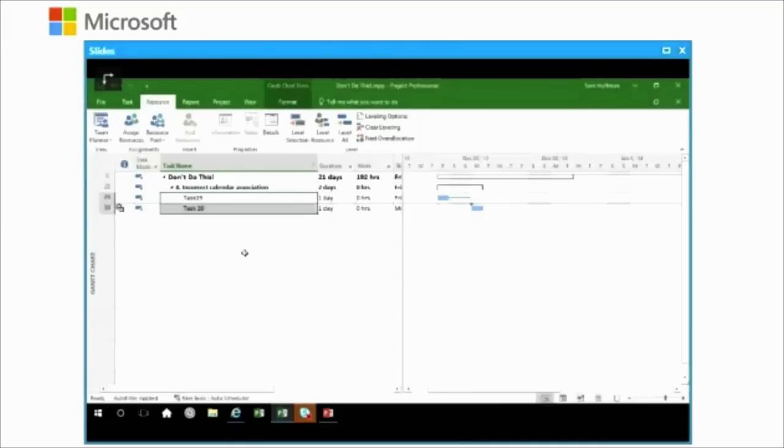Folks, there are 4 calendars that are possible in Microsoft Project. That means that there has to be some method or some rule for if the calendars have exceptions with each other, that is to say, conflict. And the calendars are, there's a project-based calendar. There is another type of base calendar, most often used with resources. So think of it as a shift calendar, like, for example, 4-10s or part-time. There's a resource calendar for people so that we can capture their time off or their holidays. And the last type, and often not known about, is called a task calendar. That's right, a task calendar.